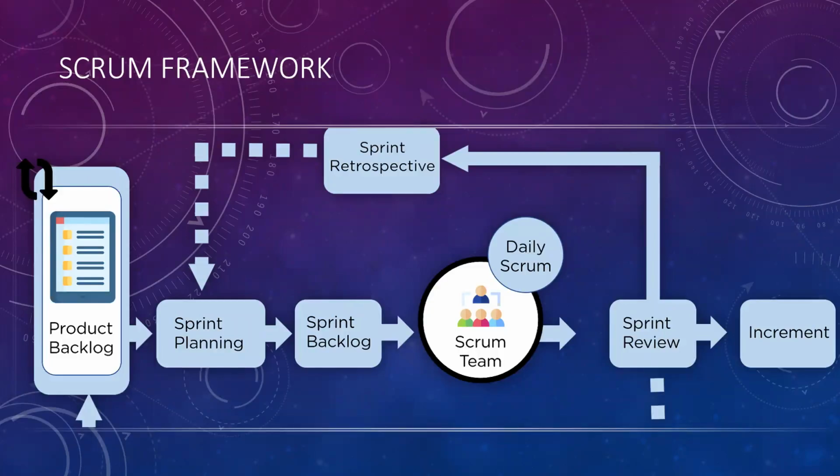Likewise, it's like a sprint backlog. We have a list of items we are getting from the customer. From there, we check which are the priority items that we have to complete as part of the sprint. We'll take these items and complete them. Again, we go back to the product backlog and pick a few more items. Likewise, it will be a continuous cycle until we complete all the items from the product backlog. Okay, got it. Thank you.